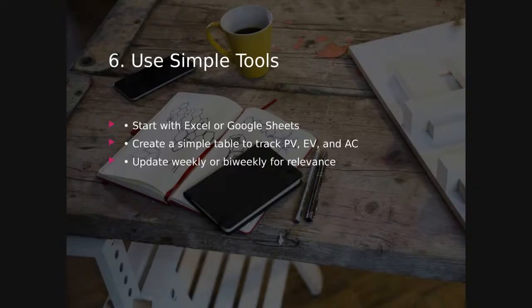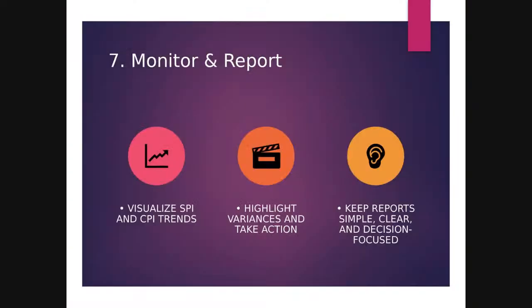You just go with an average company rate. But it needs to be based on historical information and expert judgment. It is doable. It may not be a perfect number, but it's better than nothing. All right. And then for earned value to actually work, there has to be accountability. If management isn't interested in the metrics, it is never going to work.